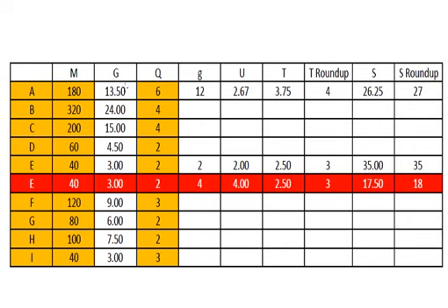Alright, so over here we can see that we've got 13.5, and we know that our typical gang size is 6. Alright, so we have to use G, or little g, in multiples of big Q, the team size over here. So we've got 13.5. So if we use 2 teams, it's going to get up to 12. If we use 3 teams, we're going to go to 18, and 18 might be a little bit of a waste. Alright, remember, because we've got only 13.5 there. So there's a little bit of a guesswork that you have to think about.